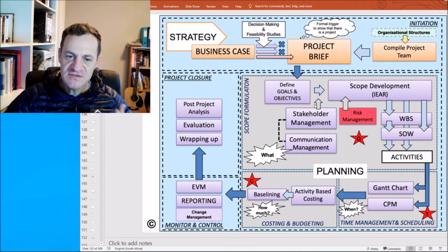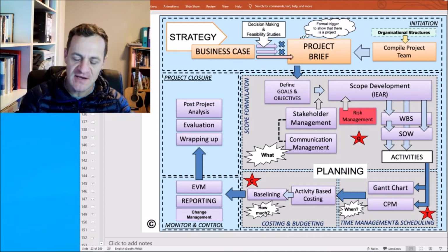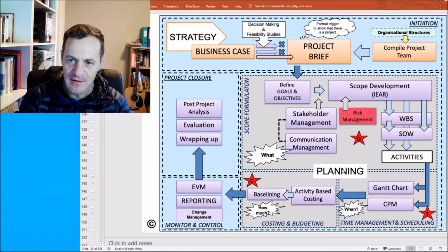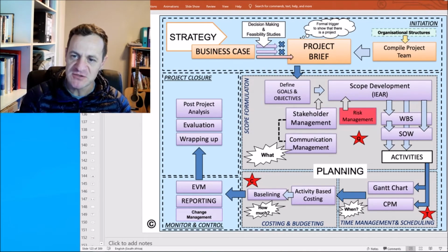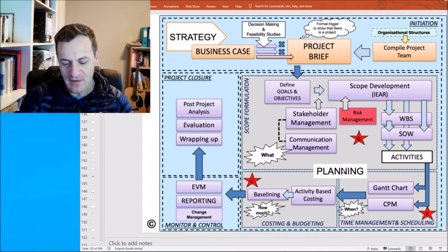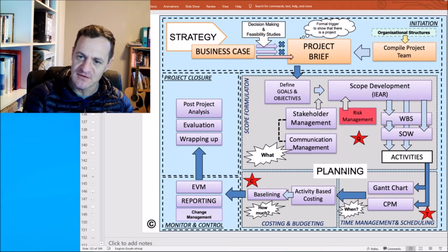So in the process of planning, the first step would be to scope. I always say, if you want to ask me what the project plan is, a project plan is three aspects. First you scope, then you schedule, and then you cost. So that's a triangle. That's the project management triangle: the performance or the scope or the quality on the one side, then the schedule or the time, and then the cost on the other side.